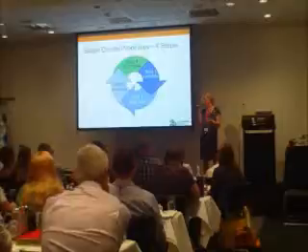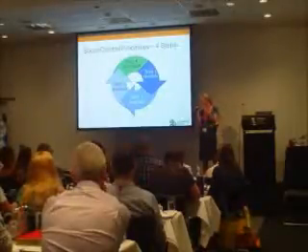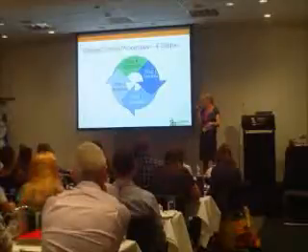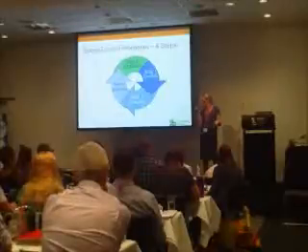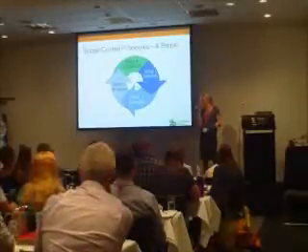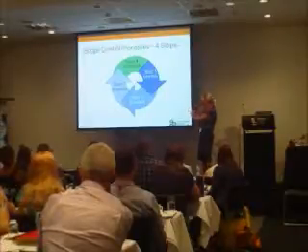You just build normal residential houses, and suddenly there's a wet area on site. And you think, oh, there must be a broken pipe underneath. I didn't know there were pipes underneath. It didn't say that on the town planning thing, whatever. So you need to investigate that and find out there's actually a natural spring there. So that, of course, is going to entirely change the type of foundations you need for that house and so on and so forth. But you needed to investigate and identify.